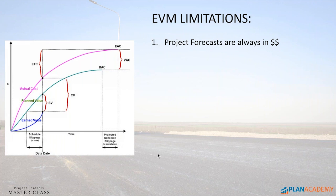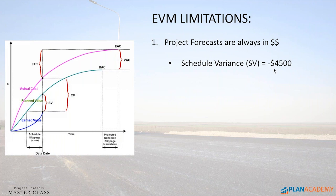For example, if I say you have a schedule variance of minus $4,500, it doesn't really help you get the picture of what's going on. My estimate to complete is $9,555 — again, it would be really nice to have those values in terms of duration.